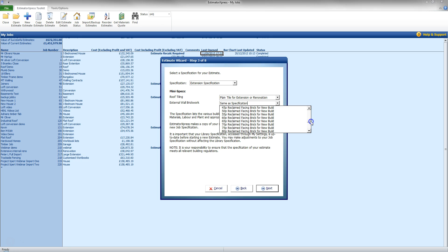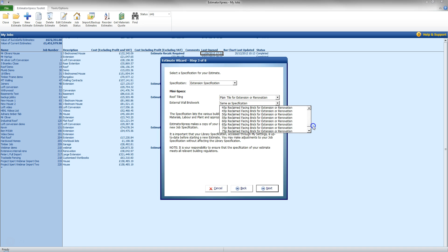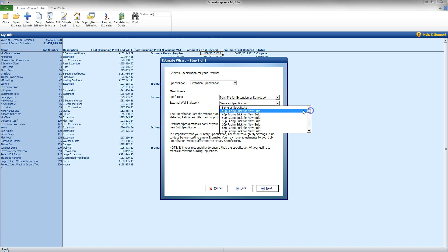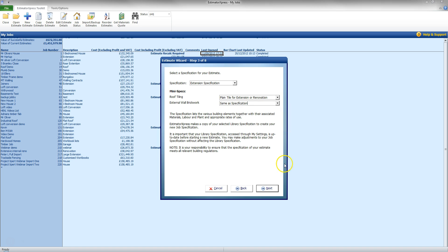So basically building your brick wall is going to take a little bit longer on extension or renovation possibly due to access or any other issues. And of course we come down here now we get to a reclaimed brick as well. That is quite important because there is even increased labour time for that as you may have to clean the bricks themselves. But for this I am going to go same as specification.